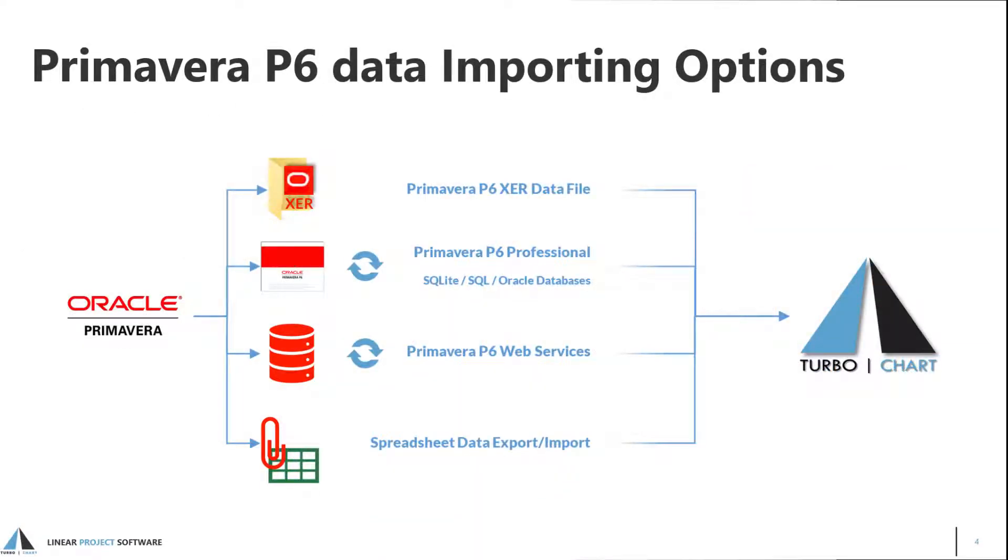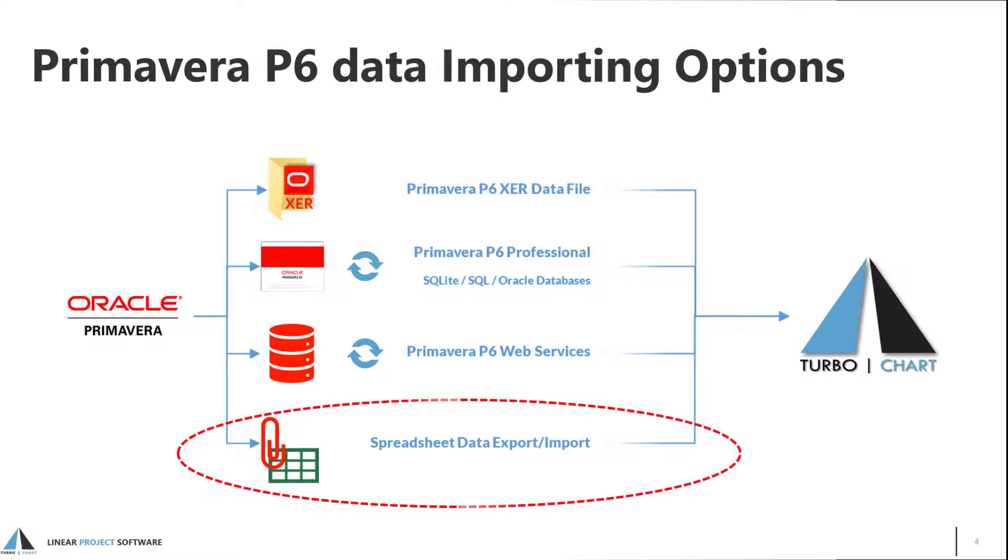TurboChart can connect to Primavera P6 data in different ways. Data can be imported using XCR files, but requires a new XCR file to be created each time the P6 data changes. Direct connections to P6 databases, including SQLite standalone and via P6 web services can also be made, enabling instant synchronization as the schedule data changes. If you are unable to connect to your P6 database directly, the Spreadsheet Import option can be used. The Paste Wizard makes it possible to easily copy data from P6 and paste into TurboChart as the schedule data changes.